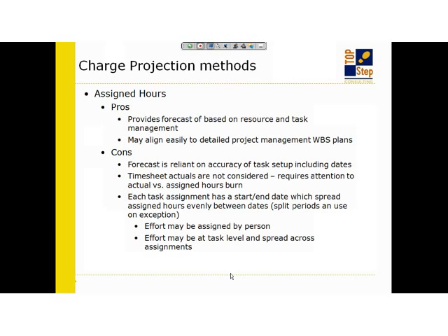Okay. I've worked with companies where they definitely say, well, you can always change the end date, and that's absolutely true. But if many of you are using project management in OpenAir, maintaining those dates on a potentially detailed task level is an overhead administration effort that PMs typically don't have the luxury of doing. So, sometimes to be able to get more accurate forecasting, the assigned method becomes a little more problematic. Or there's trade-offs in accuracy, and it's known and understood that the PMs are doing a best guess forward based on loading the task based on people. Okay.